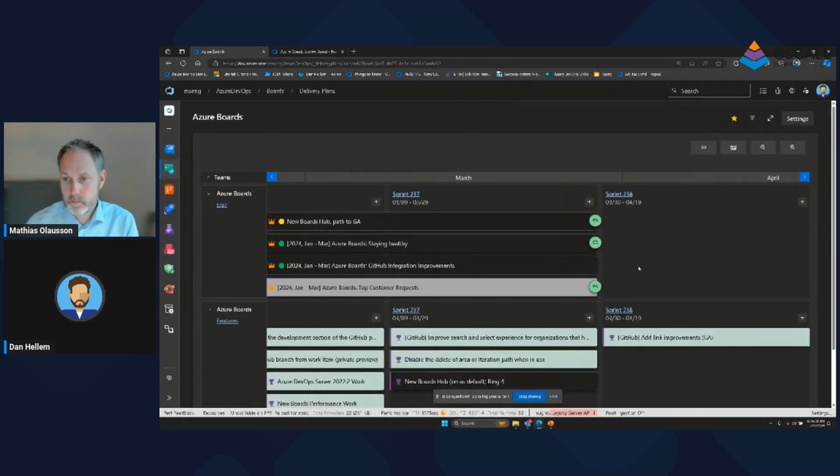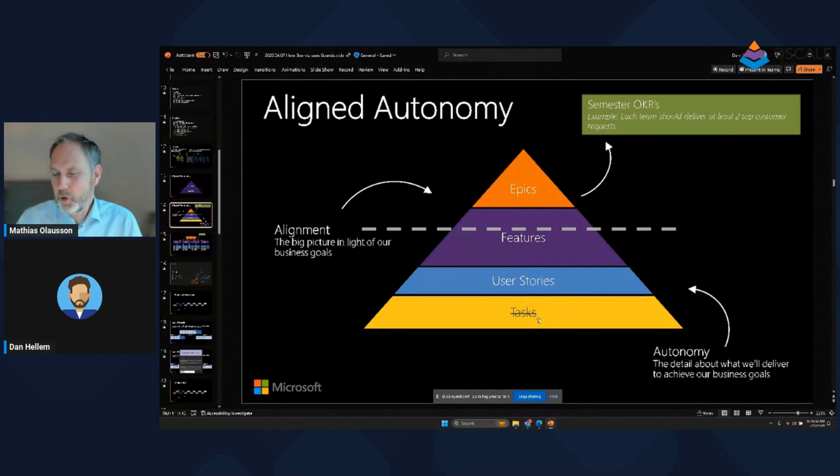So we have it in delivery plans where you can set up dependencies with each other, and it'll let you know, like, hey, they have it planned to be done next sprint, but you have it planned to be done this sprint, that's probably a problem, and we'll highlight that. But the reality is I know that already because I'm having a conversation with that team, so it doesn't really become a thing for us. Right, and it's a maturity and a cultural part of your process as well.